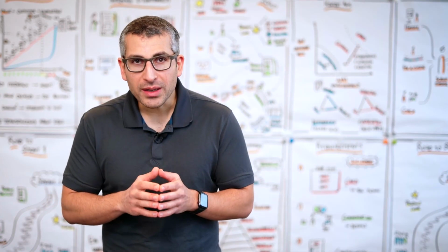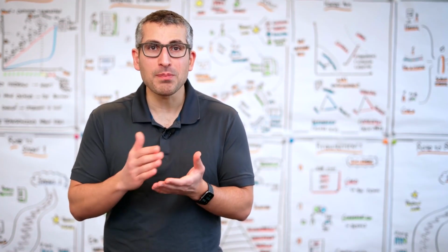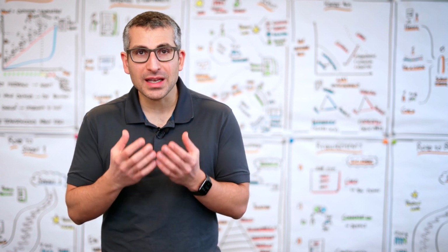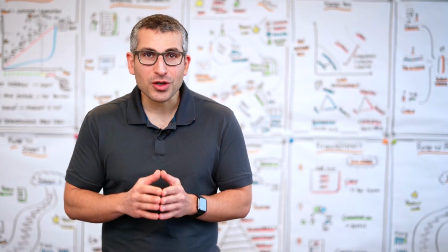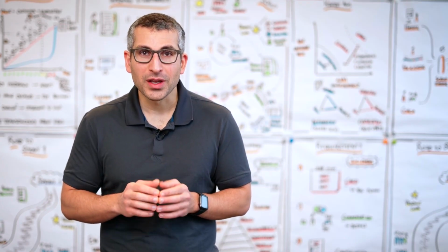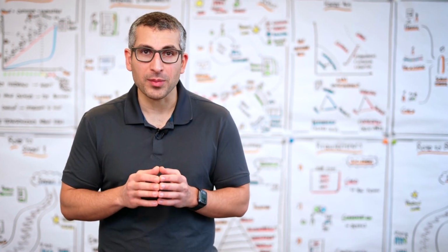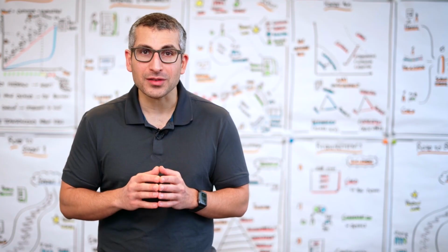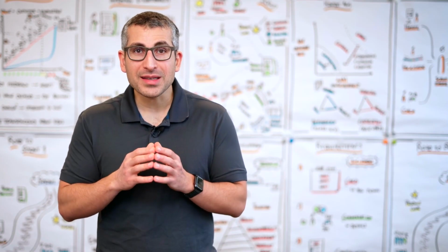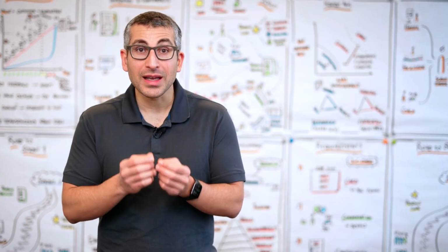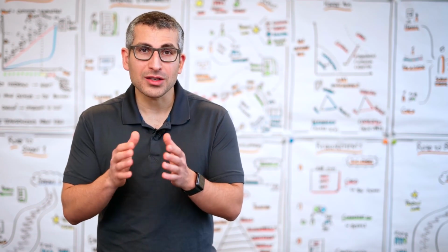But a user story is not the only way on how to write a requirement on a card. You can use many other ways. My preference is a user story. By the way, a user story is also a great stakeholder management tool, because most stakeholders approach you with the what piece of a requirement and never with the why piece. So if you want to have a good understanding of whether it makes sense to build that requirement and how to prioritize it, always ask them to write it as a user story.